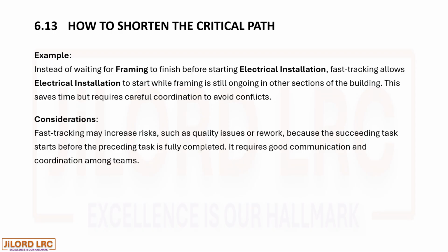Consideration. Fast tracking may increase risks such as quality issues or rework because the succeeding task starts before the preceding task is fully completed. It requires good communication and coordination among teams.